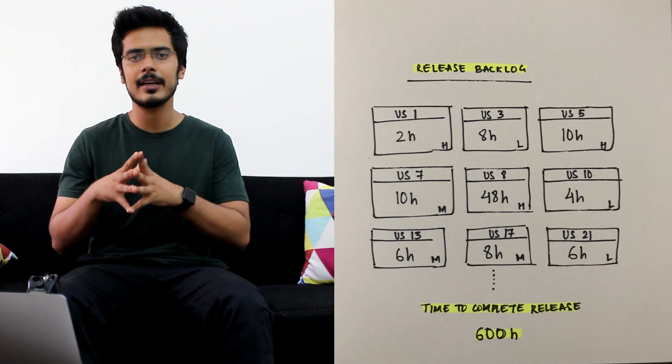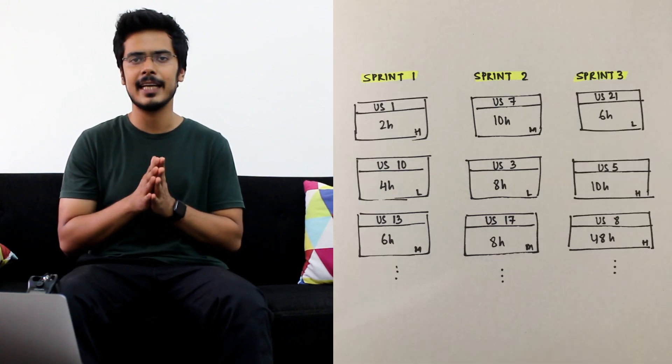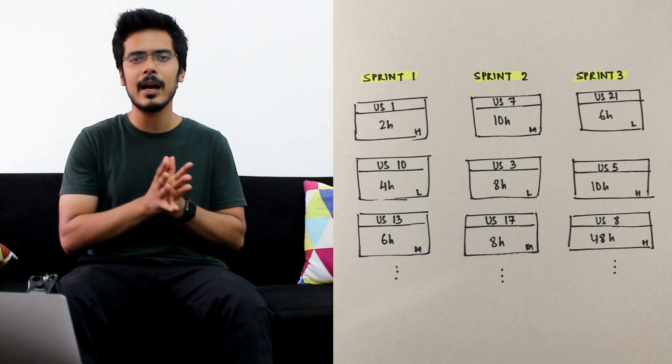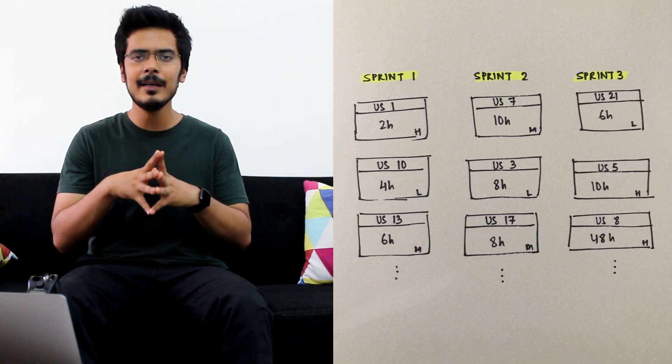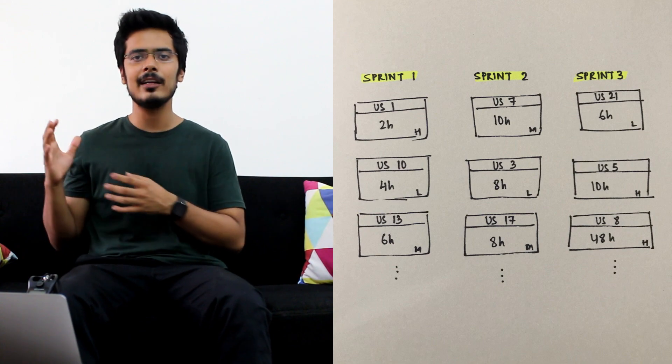Now the user stories from the release backlog is used to plan sprints during the sprint planning meeting. A sprint is essentially a short duration of time, typically anywhere between one to four weeks, where the development team picks a set of user stories that they can ship at the end of the sprint.